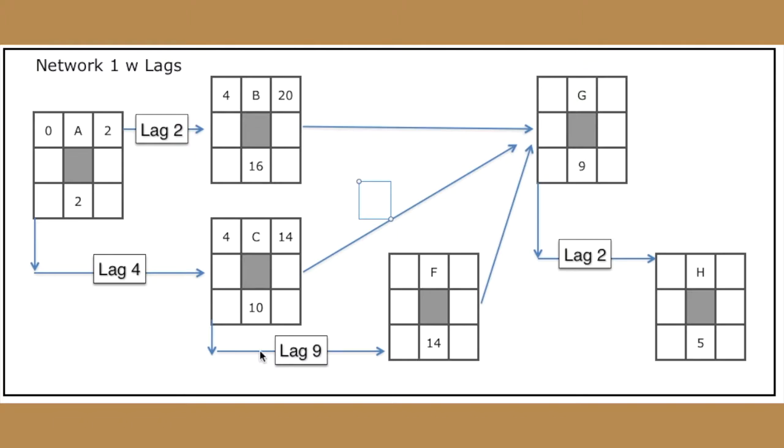F also has a start-to-start relationship, this time with C. So in this case, F can start nine days after C starts. So what we're going to do is we're going to take this four, we're going to add nine to it, which we should come up to something around 13. And then we can do our normal calculation here, adding the duration, we should get something around 27 for the early finish.